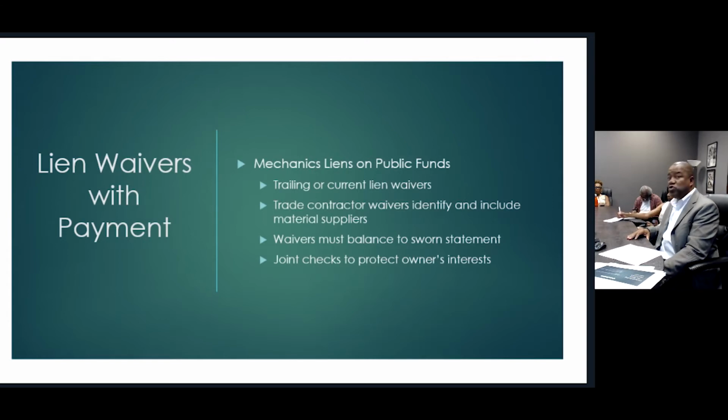Waivers must balance to the sworn statement. And as I mentioned before about that example, when I had a troubled prime contractor, and we did a joint check to ensure that I'm protected and that the sub gets paid, you'll see that a lot on public jobs.